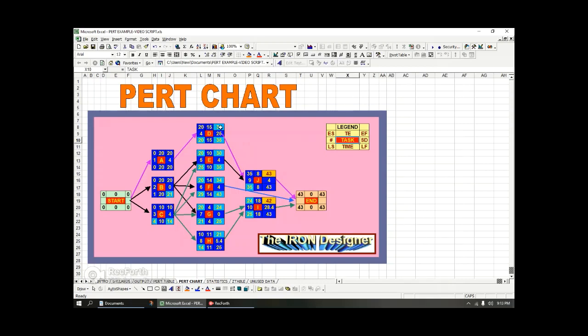And you add these together. So the early finish, the soonest D can finish, is when A ends, D starts. It has a TE. This is the sum. You go down to the next one, say E. E has a predecessor of B. B finishes on 20, plus his TE is 10. His early finish is 30. And we could just keep going like that.